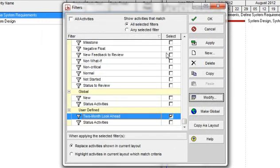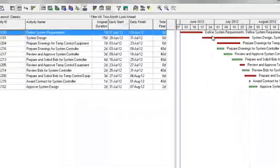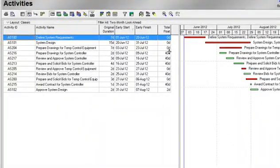The dialog box automatically closes. Now click on Apply and OK. You will now see all activities that start within two months of the data date.